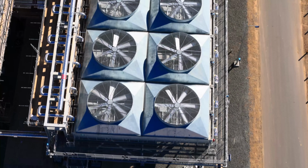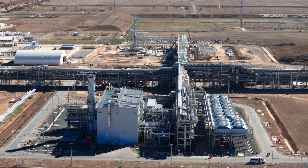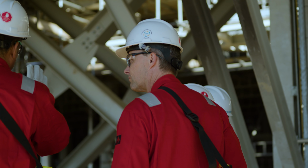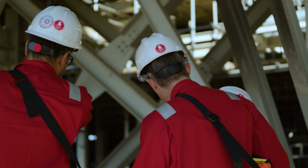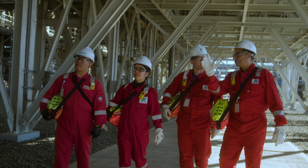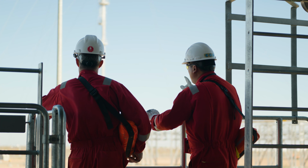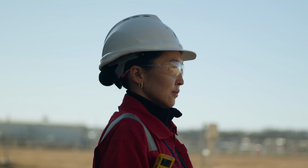KPO, continuous development of the Karachaganak field via the Karachaganak expansion project. In July 2024, KEP-1A project safely achieved first gas reinjection. This significant milestone was reached with the successful operation of the 5th compressor at full discharge pressure, enabling gas from the Karachaganak Processing Complex, KPC, to be re-injected into the reservoir through the new KEP-1A gas re-injection system for the first time.